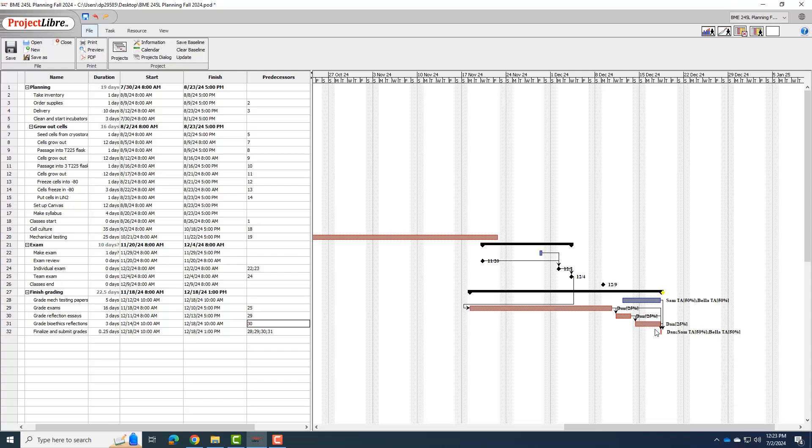Okay, so now my only problem left here is that if I spend 32 hours grading exams, I have proven to myself that I can't do this at 25% time over this time. Because I would have to start grading exams before I gave the exam. So that's not really an option. And now what? And that's why this project planning is so useful. It lets us see where our pain points are and where we really need to focus on getting help. I could maybe have the TAs help grade some exams. I usually don't do that, though. I usually prefer just me grading them all so it's very consistent. I have a couple solutions. One of them is when I realize it's time to grade BME 245L exams, I just have to commit more of my time to that. So maybe I need to commit 50% of my time to that. So I'll see if I can fix some of those things.